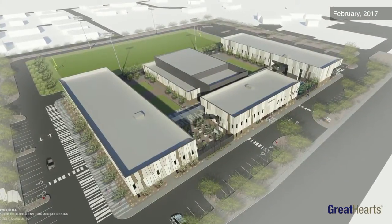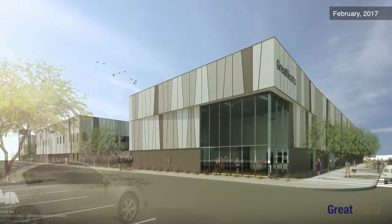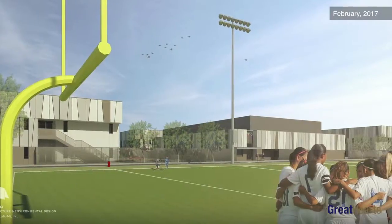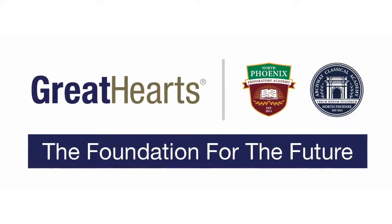Substantial completion for the entire project is going to be about June 26th is what they're telling us. We're hoping to be a little bit before that, but the buildings will come online one at a time. Probably the first one somewhere around about the end of May, and then every week or so we'll start getting into the next building.